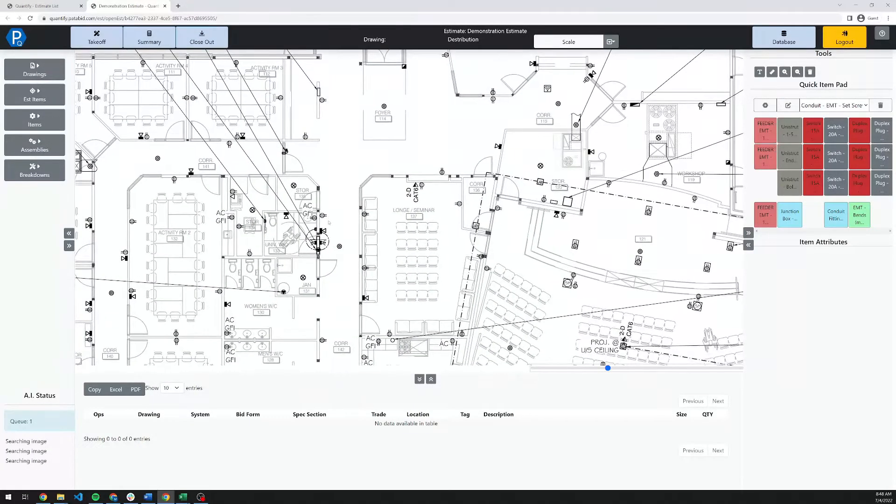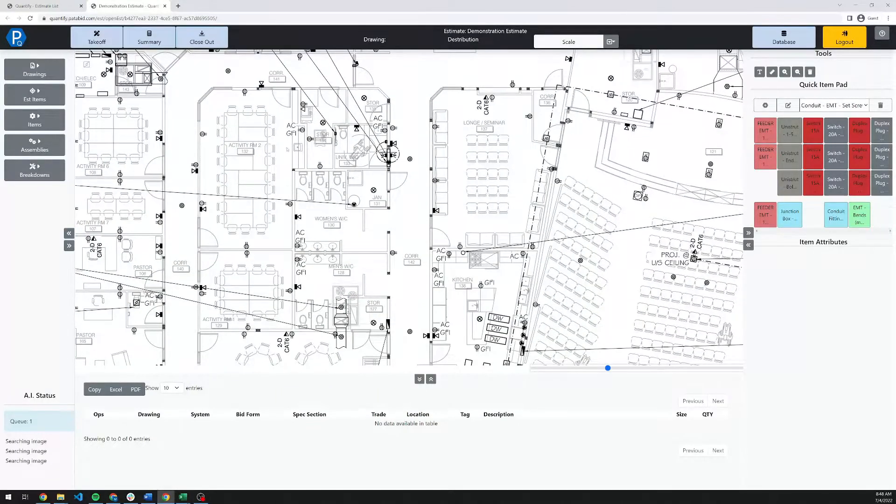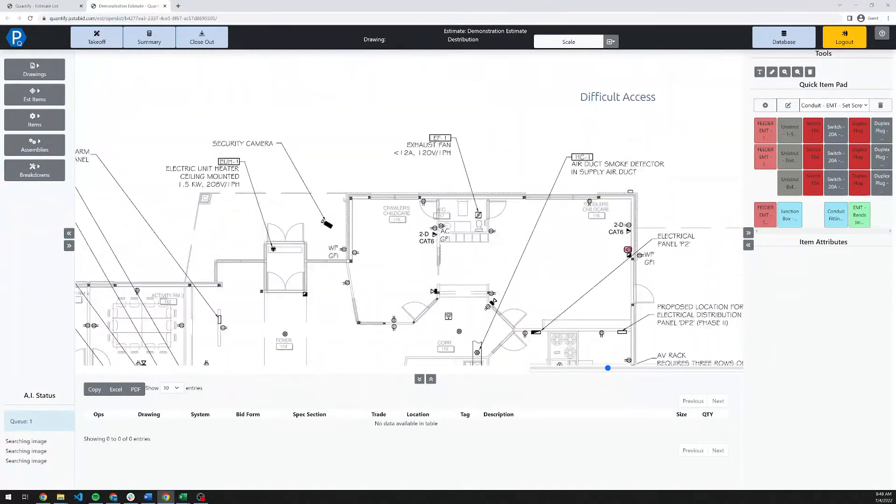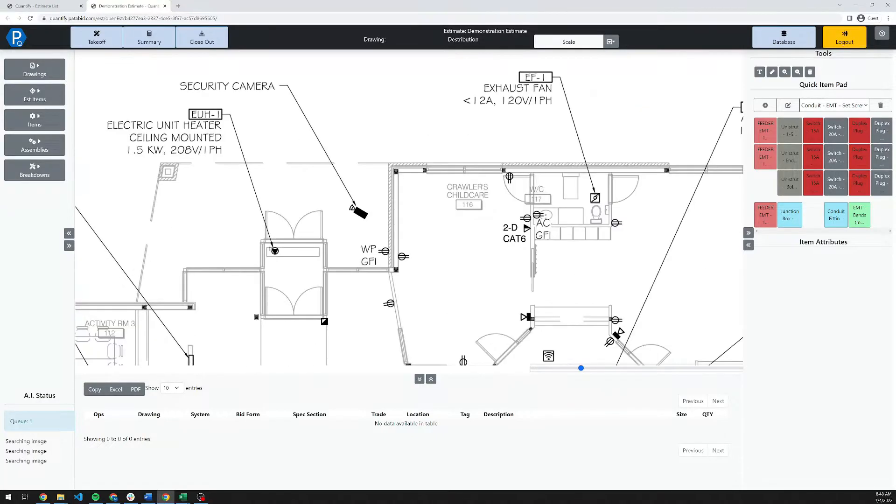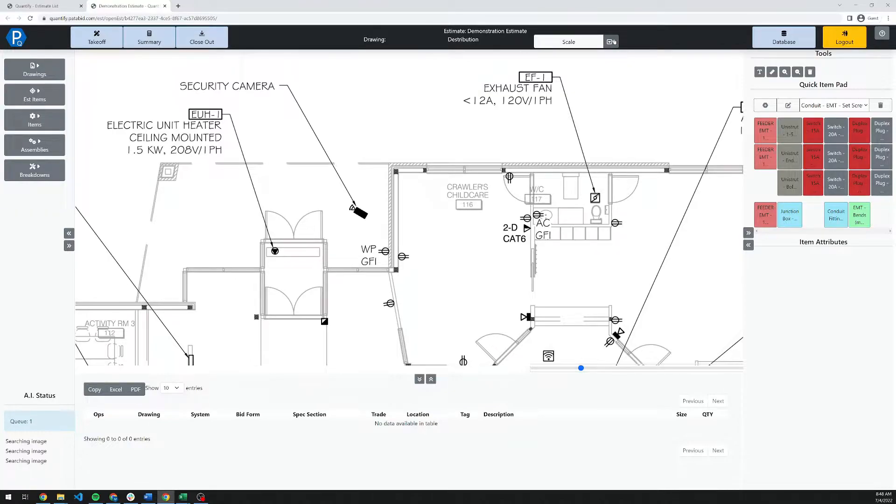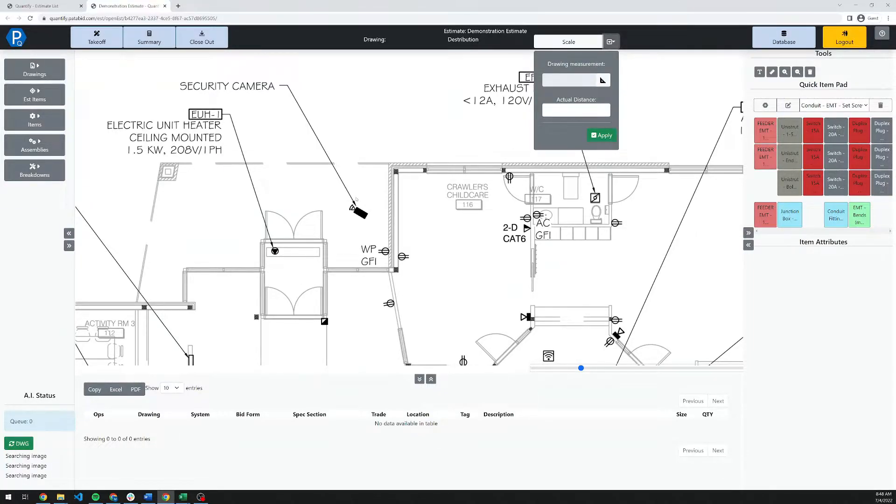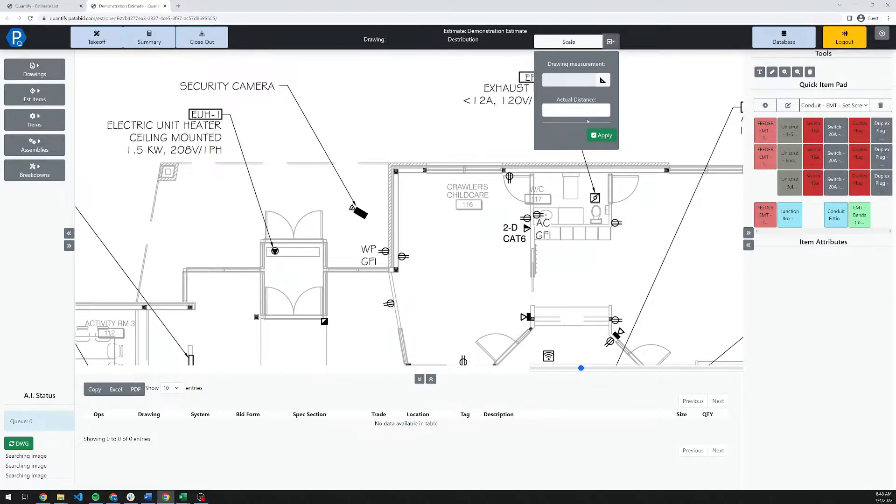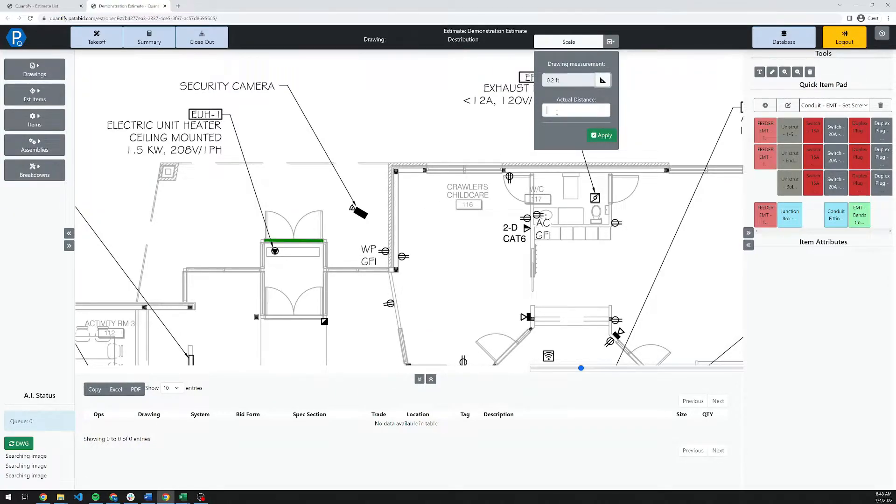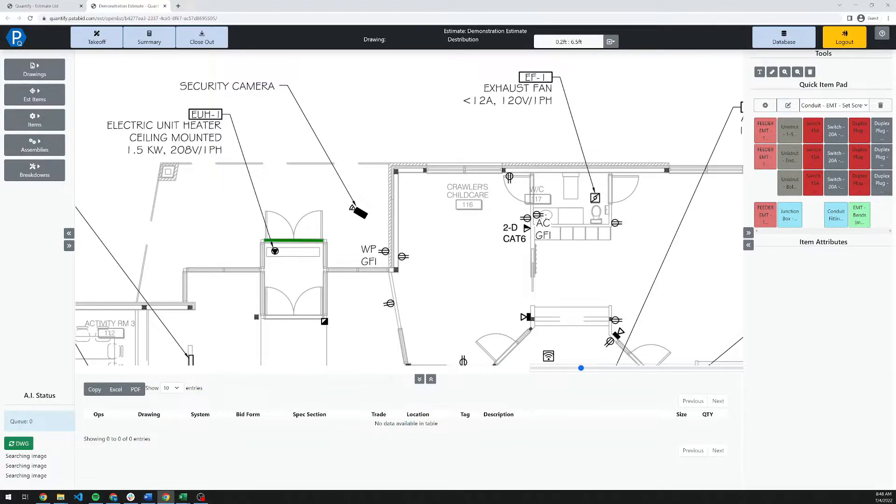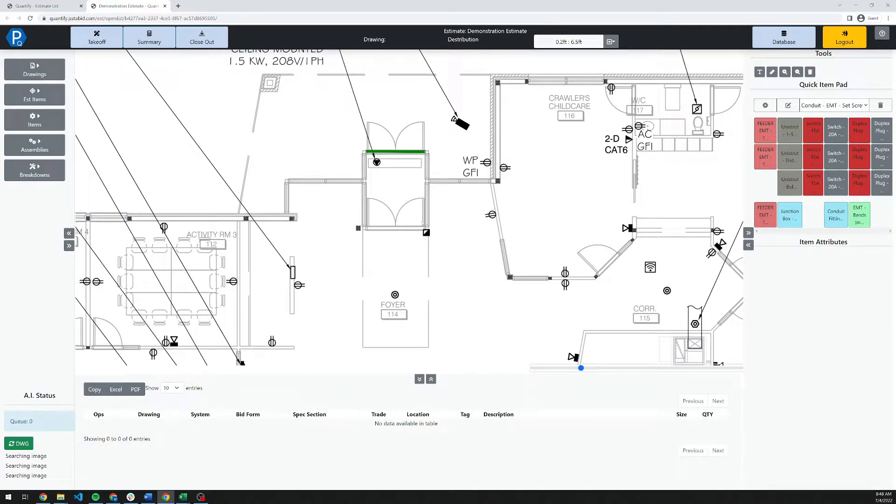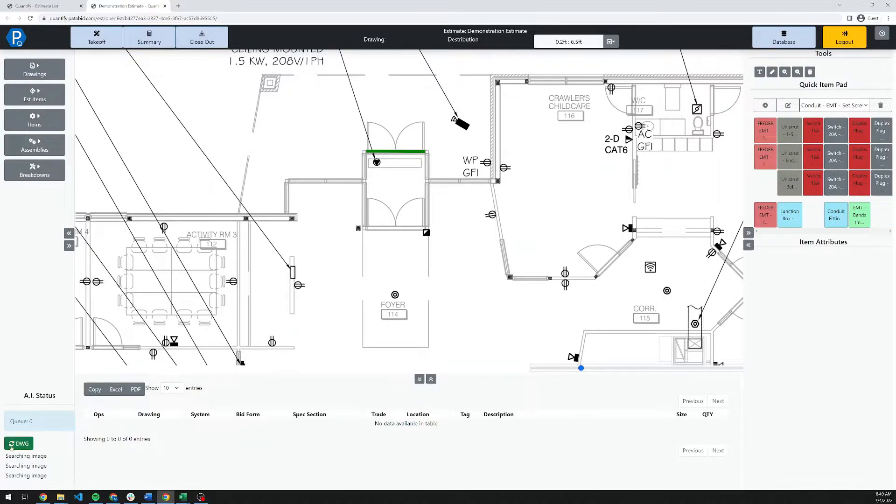In the meantime, I'm going to go ahead and set a scale on this drawing so we can do some length-based measurements here. In this platform, all scales must be set from a known dimension. This is to ensure that any adjustments made to the drawing set in PDF form while it's been going through the client or the engineers do not affect the final length measurements. To do this, I'm going to take a measurement on the drawing. We'll click this door, for example. Then I'm going to set its actual distance. This will apply the scale to the drawing. Now that that's completed, you'll see down in the bottom left that the rapid count has finished for the first rapid count.